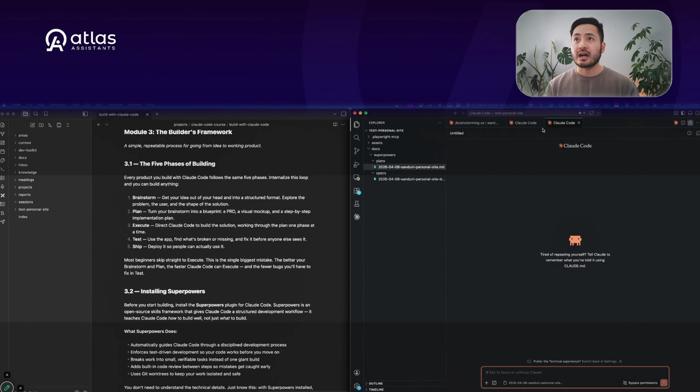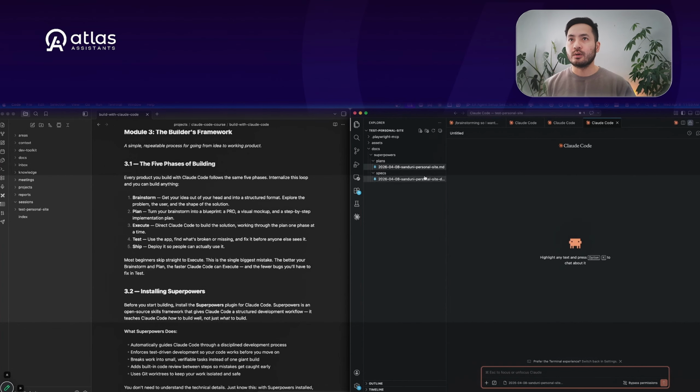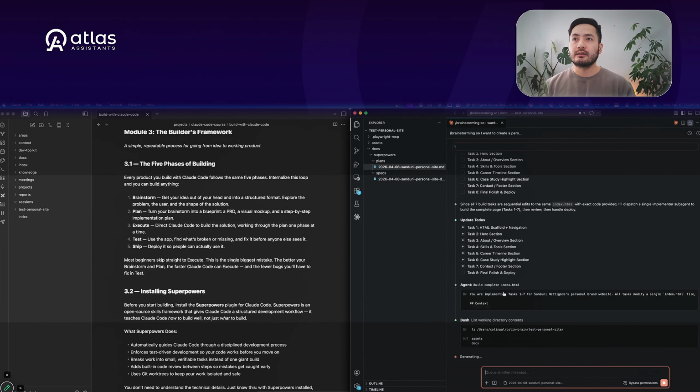That way, each time you open up a new Claude Code instance, it has its full context window, right? Then every time you start, just have it pull back in the context. If you want, you can pull in both files. Just say, review the PRD again, review the project plan, continue with task 3. And then same thing. Once I'm done with that, open a new one, pull both those in, continue with task 4, right? So right now it is, wow, it moved through pretty quickly. So I finished all of these sections already.